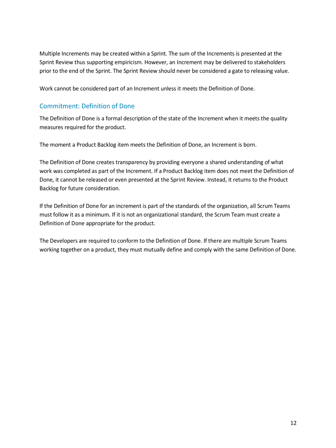If a product backlog item does not meet the definition of done, it cannot be released or even presented at the sprint review. Instead, it returns to the product backlog for future consideration. If the definition of done for an increment is part of the standards of the organization, all Scrum teams must follow it as a minimum.